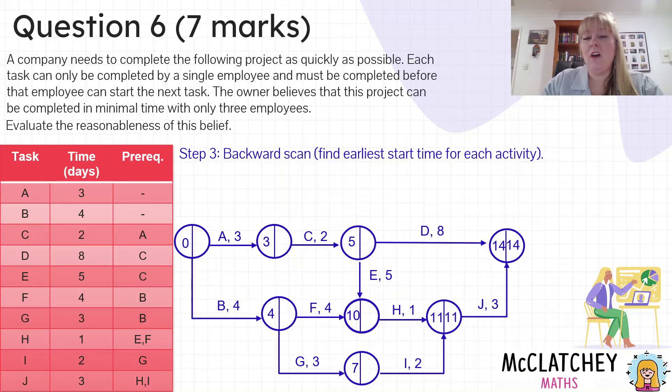If I move along activity I now, 11 take away two gives me nine. I'm now going to move along the middle pathway. 11 take away one gives me 10 with activity H, and I'm sort of reaching this point now where I have to make decisions. So I'm going to move back along the top now. 14 take away eight is my first choice, that's six. However, if I come backwards, 10 take away five is five, and I need to choose the lowest. When you're forward scanning you choose the highest of two choices, and when you backwards scan you choose the lowest of the two choices.